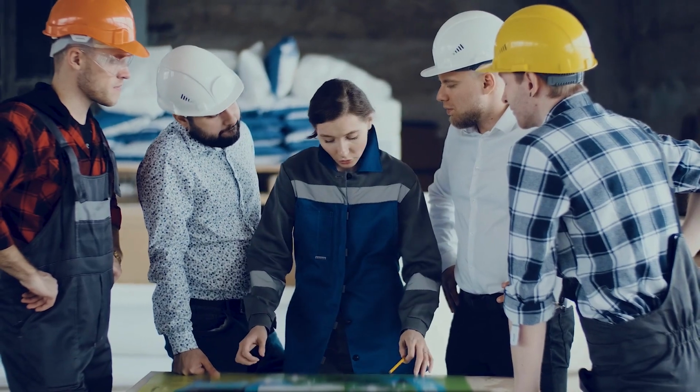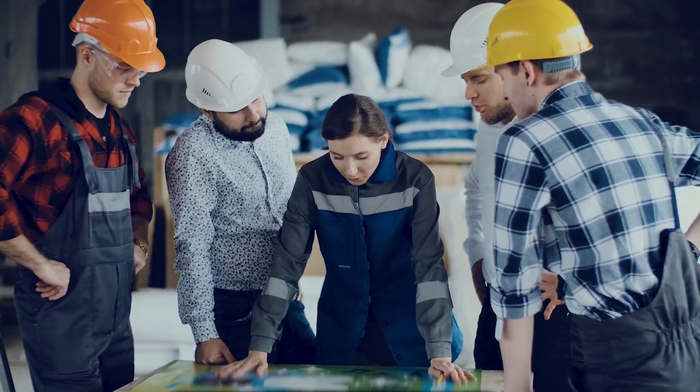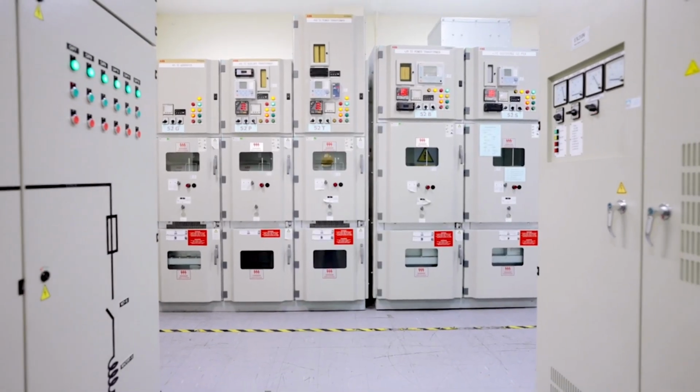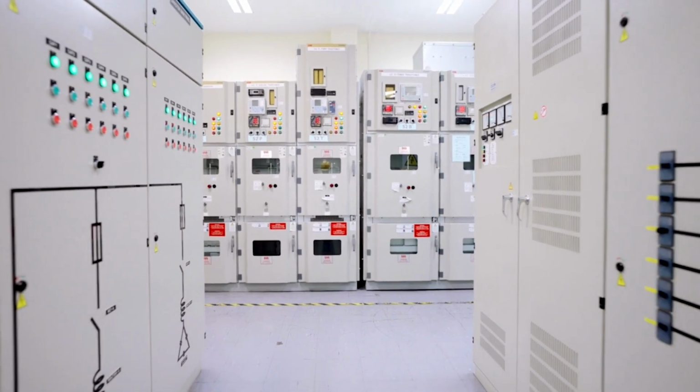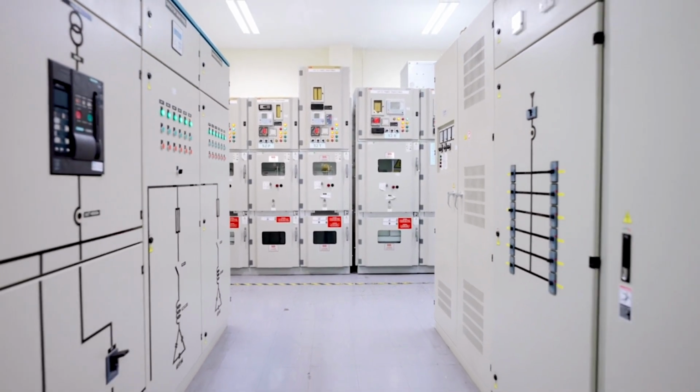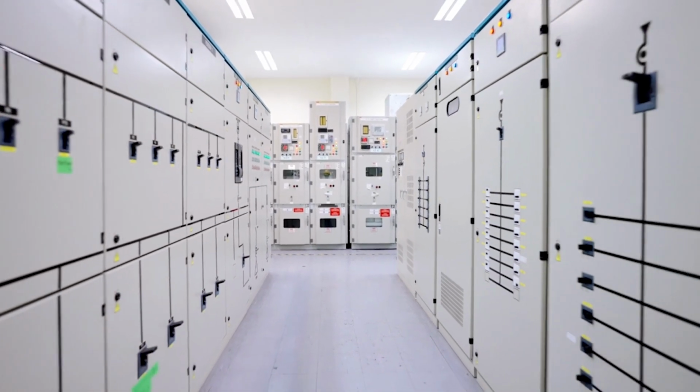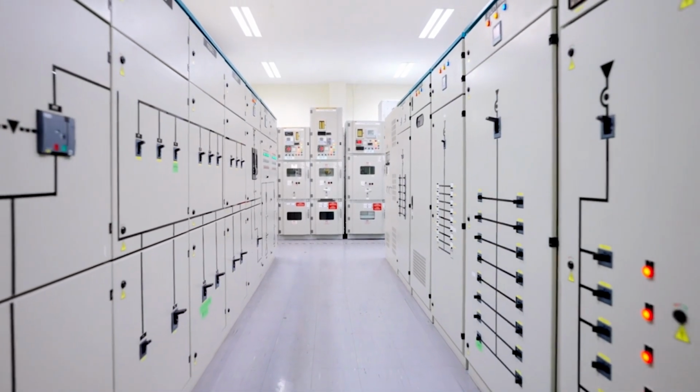The design or construction team is allowed to determine the sequence of mechanical completions. These are all warning signs that you should be aware of. The first time project stakeholders, the actual end users of the systems, likely see the systems is during on-site commissioning, and this is not the time for preferences to be implemented as changes.